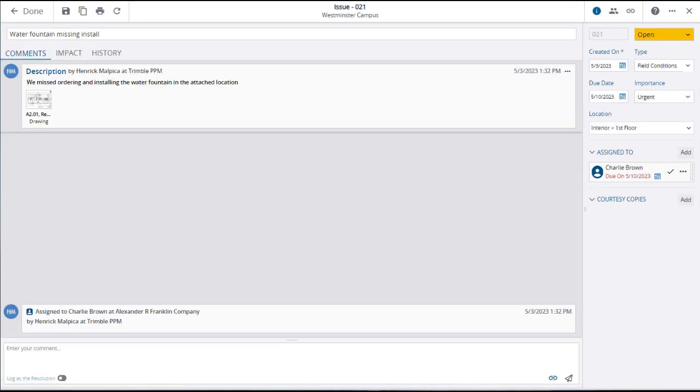Note that public annotations linked to records can be seen by all, but the linked record can only be seen by those who have the permissions to view that record. For example, there is a box that is linked to an RFI. Everyone can see the box. This is a public annotation by default. However, only those who have access to the RFI record can see the link and reference to the RFI.